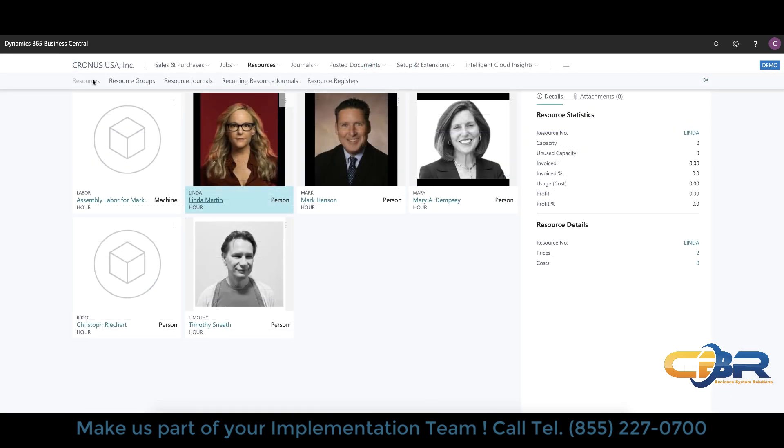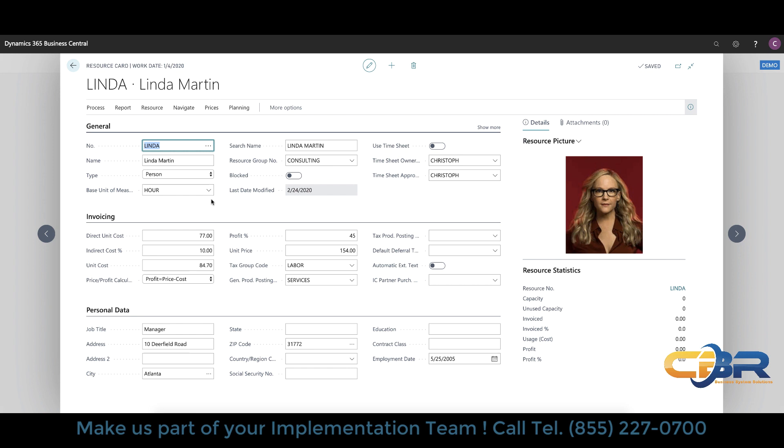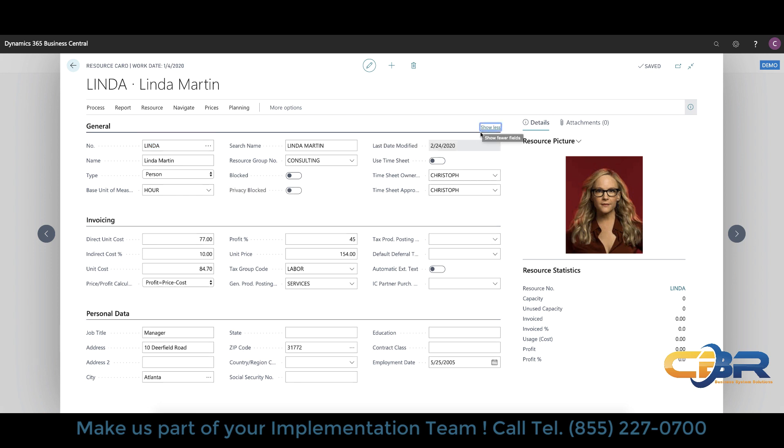So in addition to the job definition you have to also configure resources. Resources can be grouped into resource groups. They typically represent human beings but they could also be pieces of equipment or fixed assets that are being used by the company. In our case here we have some sample data of some folks that are in the database. In addition to setting up the actual resource itself you can trigger the ability of the timesheet functionality in the job costing module here as well on a user by user basis or resource by resource basis and who the approver of these timesheet records would be. So this activates workflow management capabilities in the software and they're turned on right in here.